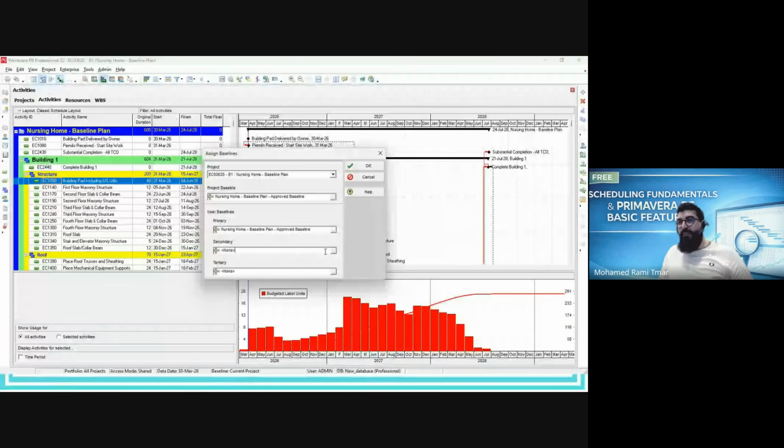Even when we have integration, you need to go and make a manual check if the progress is accurate, if the progress is good. Maybe you need to do an audit to check the other system. In engineering, maybe we use document control software like Aconex and others. We use this to verify the status of the engineering progress, if this document really was issued for review, or for comment, or for approval, or issued for design or for construction, etc.